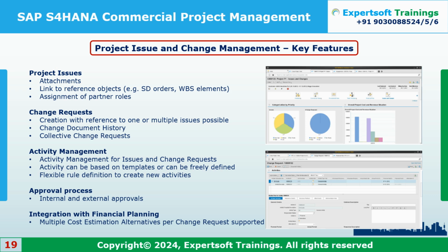After the approval, let's say you saw a risk, the risk was registered, an estimate of 20 lakh was done, and finally the project manager and the client both approved it. Now that 20 lakh rupees has to be added to the cost plan, correct? In the cost plan, it is not added. It has just been estimated. After the approval, I will add it to the cost plan.